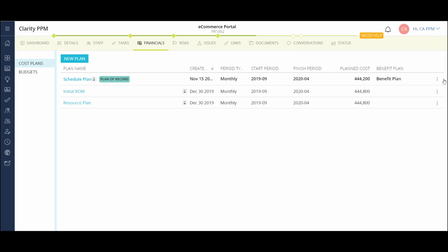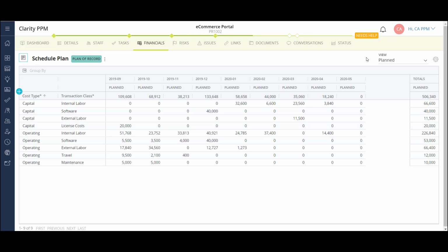Once the cost plan is detailed to the level I need it, it can be submitted to become the budget for my project. The ability to submit a budget is separated from the ability to approve a budget by access rights. We can give those rights to the appropriate users in each organization. Many companies view project financials as a difficult and tedious process. Using Clarity to set up the framework behind the scenes simplifies the process tremendously.